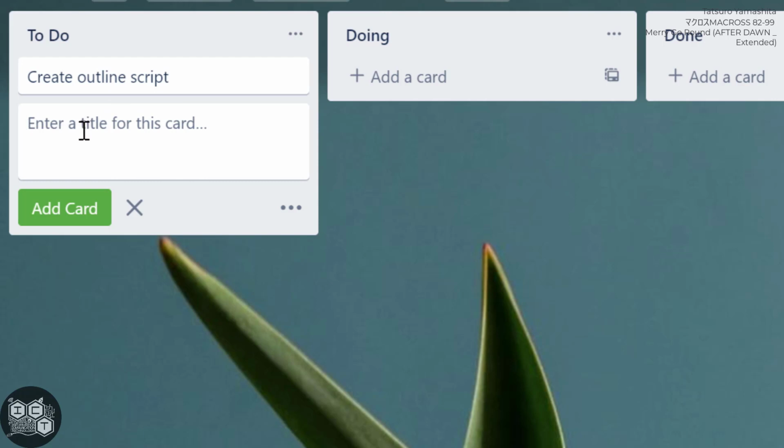For now, it's best for you to have these titles or these tasks placed here. So your tasks are based from your Gantt chart. And your Gantt chart is based from your work breakdown structure, which is then broken down according to your project activities or your detailed tasks. Let's say when you're creating a script, first you have to create an outline, and then afterwards you can actually create the dialogue or create, let's say, the entire script. If you just have create script, then that can just be a project activity. If you divide it like this, it could actually be more of a detailed task.